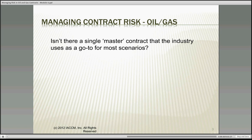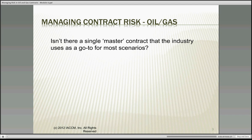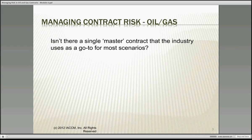The answer is that there hasn't emerged an industry norm. We'll see within the construction industry, AIA and FIDIC are documents that tend to be very common. However, within the oil and gas sector, there is not really a formal oil and gas contracting portfolio of master agreements, or even a master contract, that we use in our contracting scenarios.